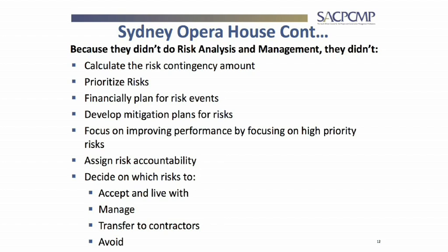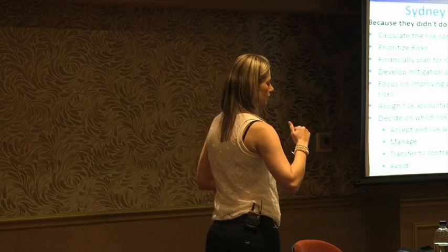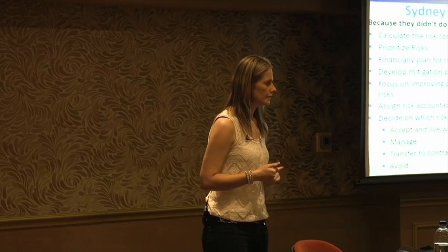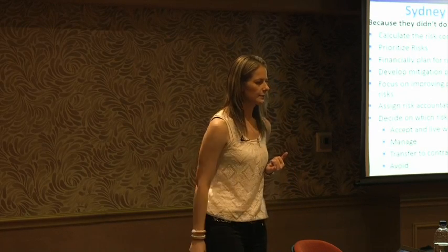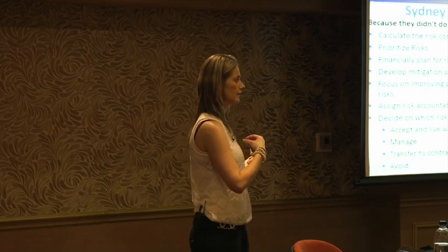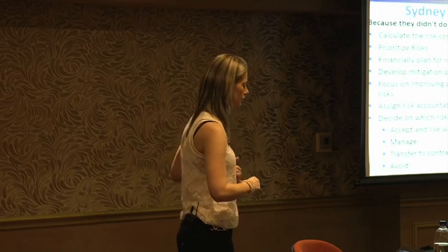And I'll say, well, let's do a calculation. If we fly them in and we buy out a production line, for example, it's going to cost us 30 million rand. But of course, we'll go and do the exact calculation, just giving an example now. However, for every week that we overrun this project, we will pay the contractor his P's and G's and his downtime, because now he's waiting for us, because we, maybe as the client, would supply the valves. It will be a free issue item.